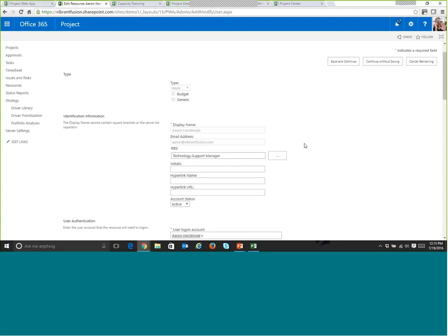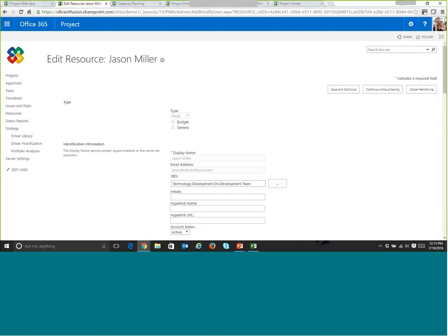As I mentioned, the PM can still go ahead and assign work, but they'll get warnings and little indicators in their project schedule to say they don't have the permission or the approval to assign this resource work on their project. So they would go through, I'm not going to go through all these guys, but they would go through and set that option for each of their resources, save it, and then at that point, it's been activated for that particular resource.